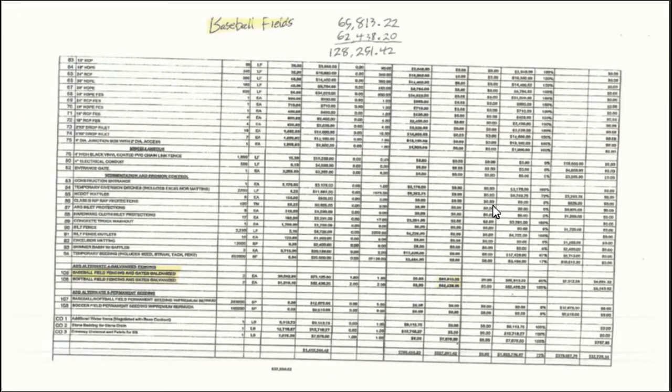Here is a sample of a continuation sheet from a pay application. Here you see 2 lines have been highlighted, and it's noted here at the top. You can do it on the side wherever you have some space to list the specific scope item that those charges apply to. Then add them together, and then we have a total that will be applied to that particular scope item.